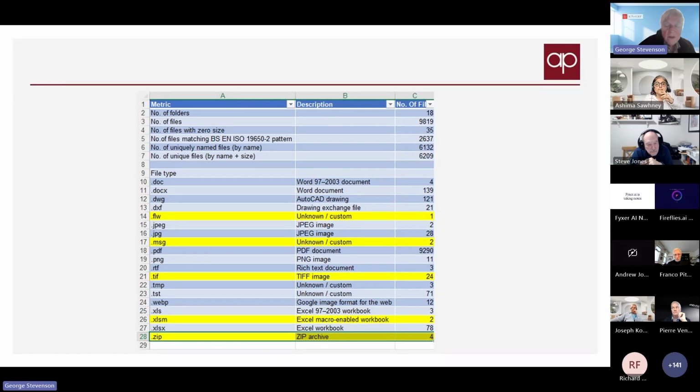And what we discovered was that there were zip files within zip files within zip files in the O&M handover information. My colleague Tim calls it like a Russian doll. It's only when you actually get down and open those up that you find that there's a problem.